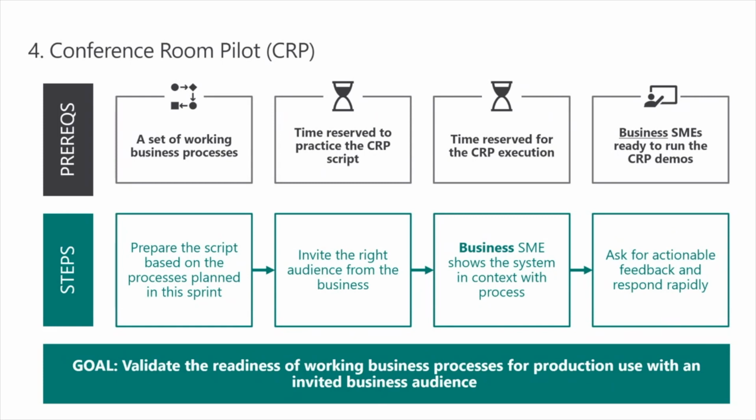And if there's enough interest from the audience, we'll do a follow-up tech talk, devoting some time to those specific areas. But the idea behind this is you've got a prepared script. You know what you've delivered in the sprint. The script says, this is what I'm going to show at the end of my sprint, how it works within the system. It has business data in it that is meaningful to the invited audience. It's got the right flow, with the person explaining the processes using their language. It's a process that really engages the business, and you get high quality feedback from the business audience as well.